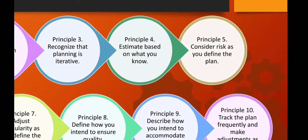Principle four: estimate based on what you know. The intent of estimation is to provide an indication of effort, cost, and task duration based on the team's current understanding of the work to be done. Principle five: consider risk as you define the plan. If you have identified risks that have high impact and high probability, contingency planning is necessary.